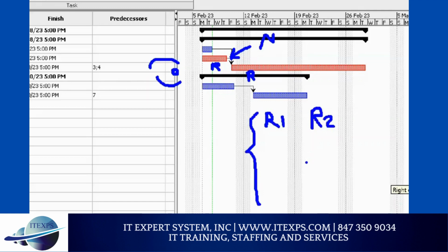What other options do you have? Clearly, speak up clearly. More time. Can't get more time. Remember, you get fired in real life. Make sense or no? If you're delayed by a day or two, you get fired. So this is very risky. That's why it's called critical path. So asking for an extra day is not going to happen. Then working overtime. So there is another option, working overtime. But if you work overtime, what will happen? It will increase your cost. That may not be a good option. Do you agree or not?